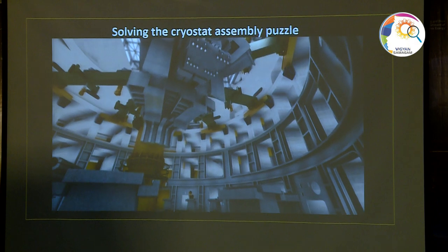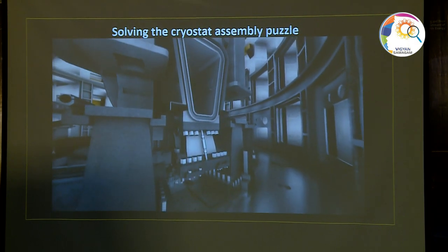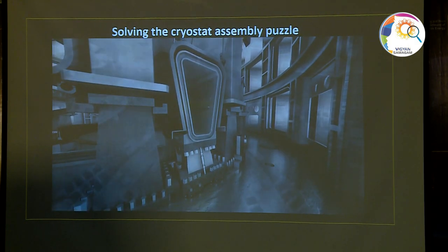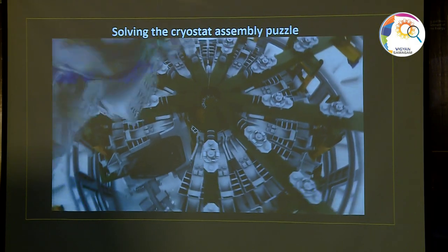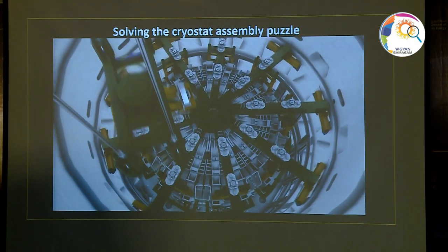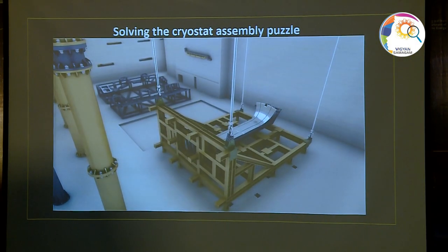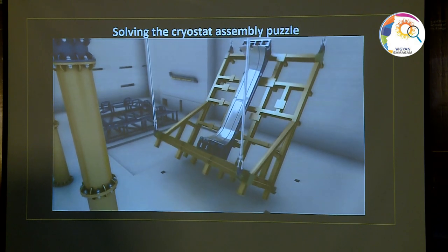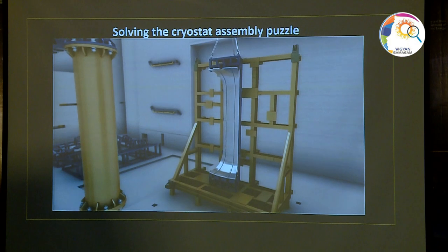The accurate alignment of the tokamak components, particularly of the magnet system and in-vessel components, is essential to the successful operation of the machine. Assembly sequences have been planned with this in mind and will utilize sophisticated optical metrology techniques at each step of the assembly process. In all, 161 different types of custom tools will be required to assemble, lift, and finally maneuver ITER's supersized components.